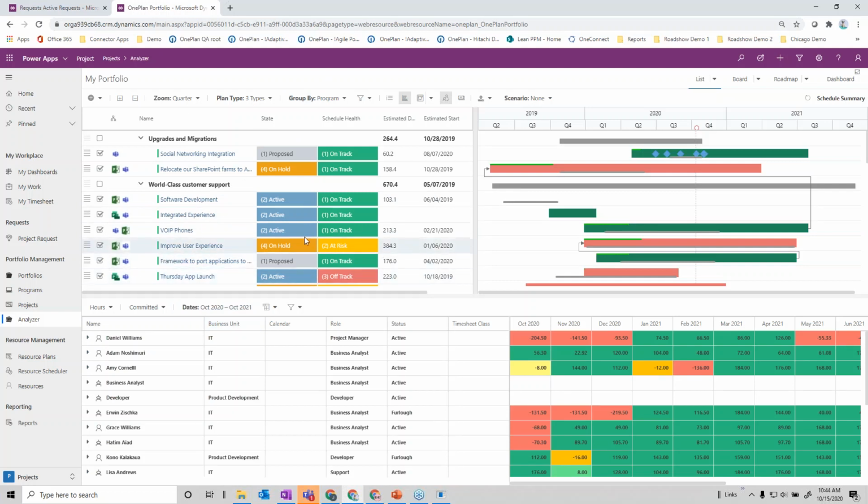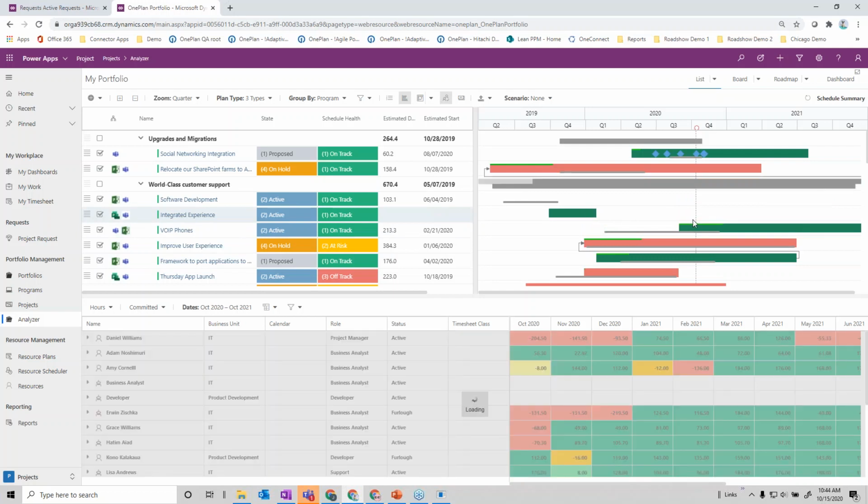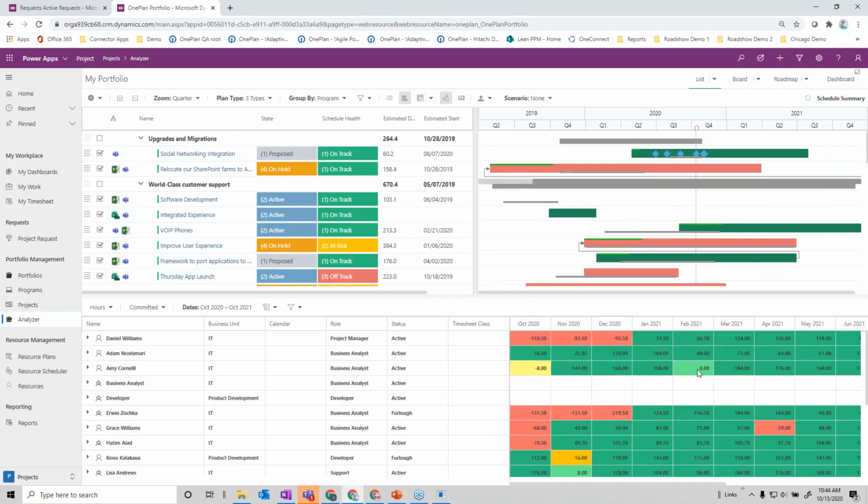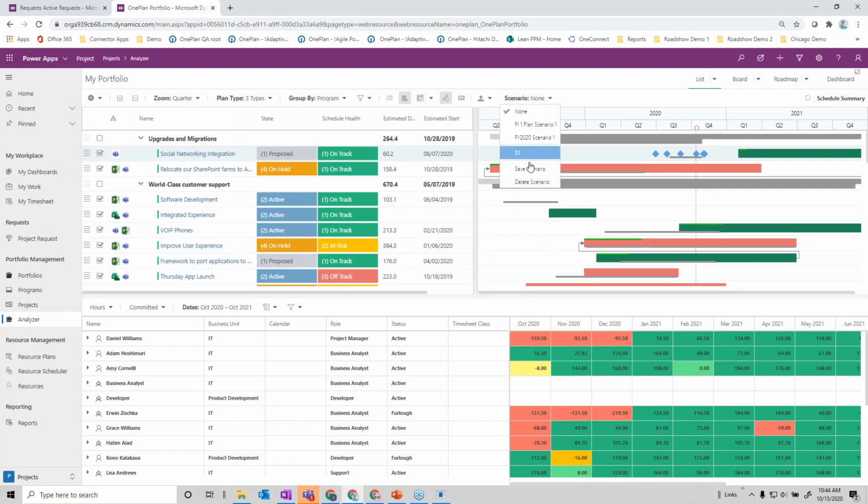I could do it based on selection and deselection of projects, or a combination of that as well as moving projects out in the timeline and say, what if I stage these things differently and have it update the resource plan below and see if it solves any of the issues I have. I can look at whether a combination of selection, timing and staging of my projects fits within our resource plans. And then I can save these as scenarios that I can revisit later to see which course of action might be the best one for us to take, or review them with others in the organization.